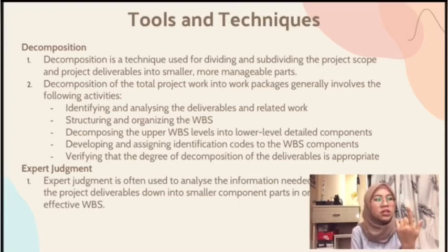Second is structuring and organizing the WBS. Third is decomposing the upper WBS level into lower level detailed components. Fourth is developing and assigning identification codes to the WBS components. And lastly is verifying that the degree of decomposition of the deliverables is appropriate.